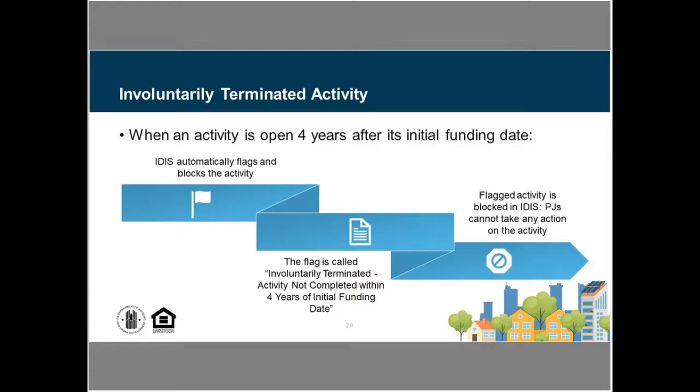Are they on schedule with the projected timeline? If there have been delays, that narrative might be identifying what those delays were, and what steps they had already taken to try to ensure that that project would be back on schedule. So that would give you information earlier than these 90 or 30-day warning flags, and that might be very helpful for the PJ to get that information as early as possible.